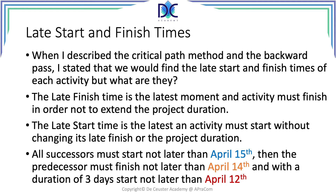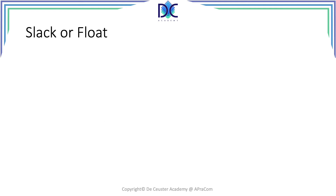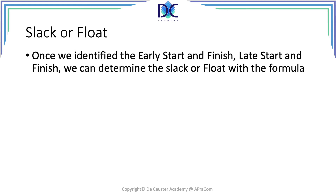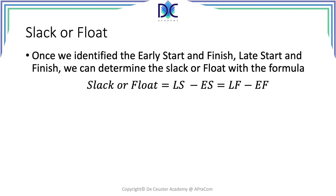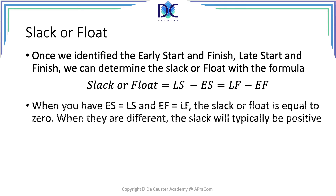That covers early start, late start, early finish, and late finish. Now let's look at the definition of slack or float. We can calculate the slack or float with the formula: late start minus early start equals late finish minus early finish — it is the time between those early and late times. When the early start equals the late start and the early finish equals the late finish, the slack or float is equal to zero. When they are different, the slack is typically positive.